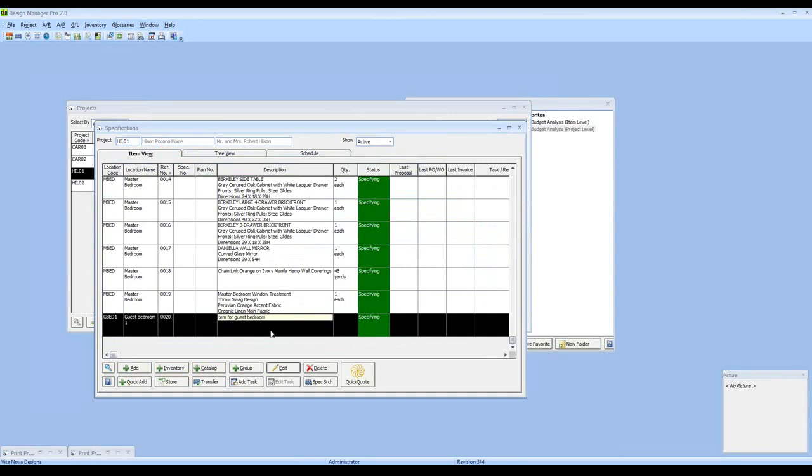So the warning brings up a very valid message indicating the current state of the budget, but allows you to continue, versus the blocked entry where we saw that you cannot continue at all, and we must either lower the price of the item or have the budget raised by the appropriate authority within the company.